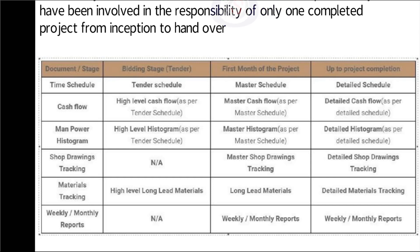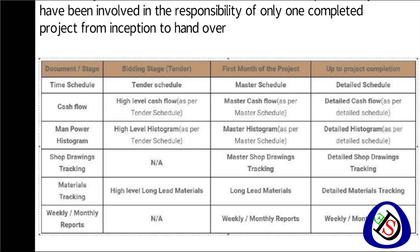The third row covers manpower histogram: high-level histogram as per tender schedule, master histogram as per master schedule, and detailed histogram as per detailed schedule. The fourth row is shop drawings tracking: not available for bidding stage, master shop drawing tracking in the first month, and detailed shop drawing tracking up to completion. The fifth row is materials tracking: high-level long lead materials in bidding stage, long lead materials in first month, and detailed materials tracking up to completion. Weekly and monthly progress reports are not available for bidding stage but are required from the first month through project completion.